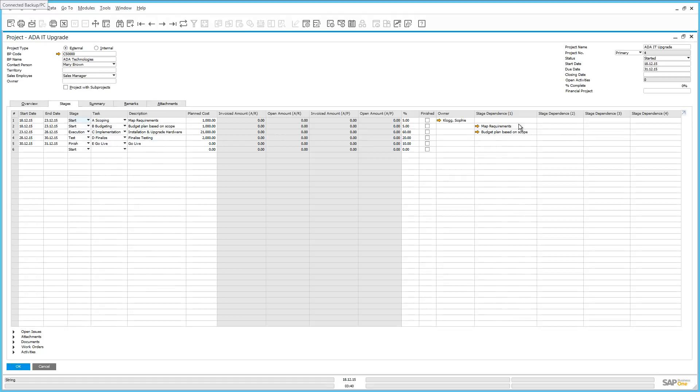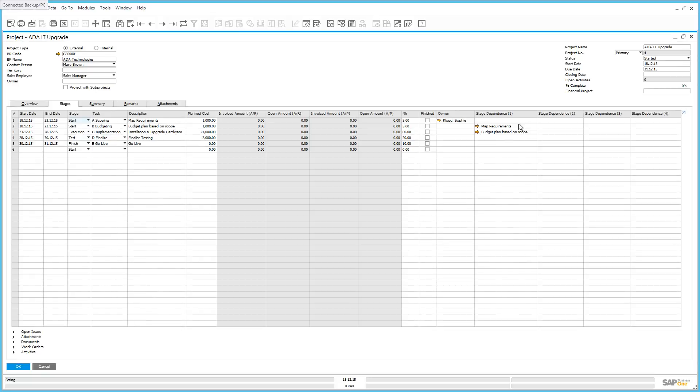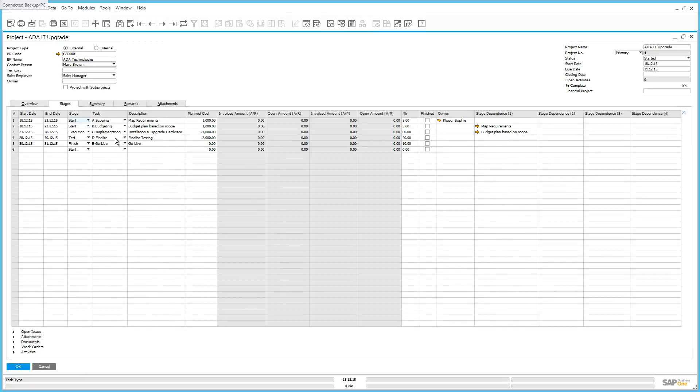And what this means is you can't move on to the next stage until a particular stage or task has been set as completed. Here we have a dependency between the mapping of the requirements and the execution stage. And what we need is to have all of the budgets and scoping signed off by the customer prior to the installation phase. For this particular project, we have a scoping task. We then move on to budgeting, which actually happens in parallel with the scoping phase. We then move on into the implementation phase. And then we have a finalize as well as the go live phase.